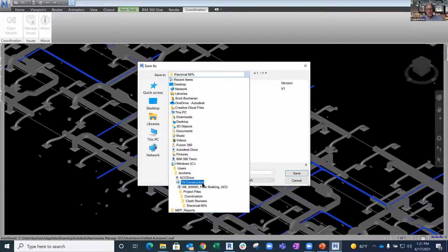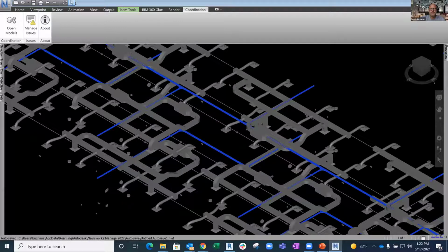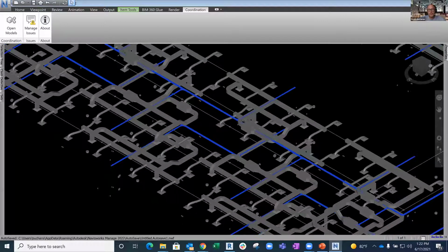If they fix the cable tray for real, and not just say it, move it up, make that change. If you have active clashes inside of Navisworks, when you rerun that test, it will change all those clashes to resolved for you. Okay, so they're going to be sitting as active or assigned or whatever you put in your normal Navisworks clashing, but that will actually work, which is what Glue would do as well. And model coordination wouldn't do that until I think the beginning of the year or maybe late last year, we added that functionality.